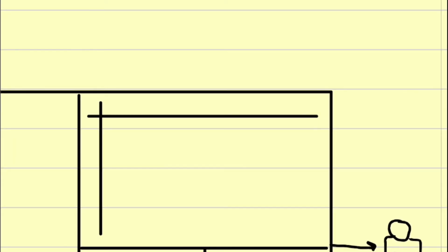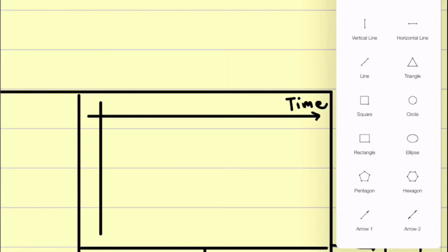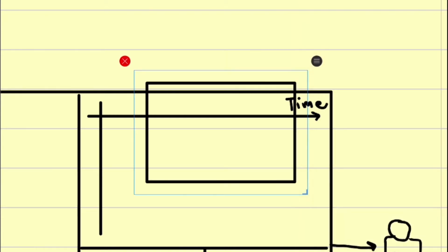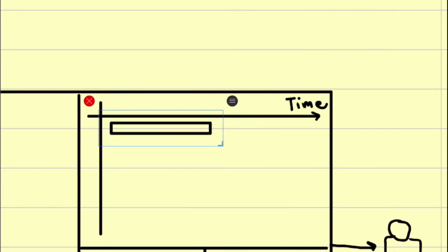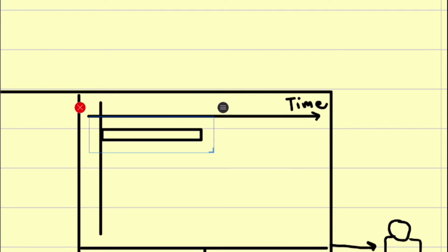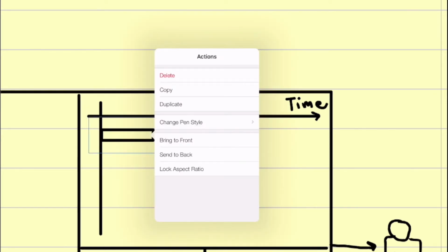Imagine we have a project that means building a house, okay? So how do we create a timeline? We get the time on one axis, and then we get activities that we are going to perform. We will call them later on work packages, Arbeitspakete in Deutsch. Activities that we perform in this time, okay?